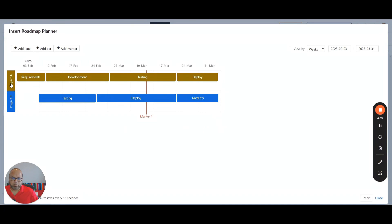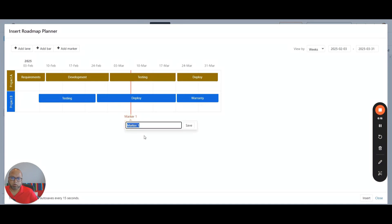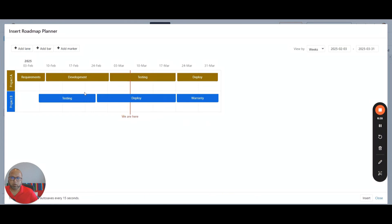So this is how you show the timeline for project A and project B. This is something you can move depending on what's the date today. If the date today is almost March 7th, you can change this here. I can also change this marker one to say we are here, so that you can move this on a weekly basis to show people where you are in terms of the project timelines. If it was here, I know project A is being tested and project B is being deployed.